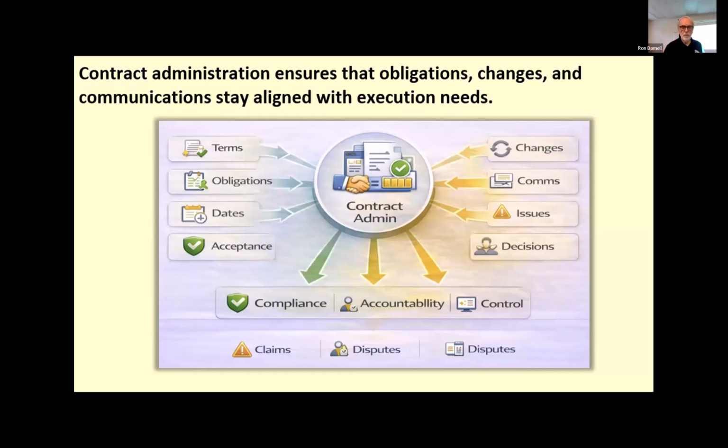From the perspective of the project, contract administration includes monitoring contractual obligations, verifying that agreed deliverables are being provided, documenting key communication decisions, and managing contract-related issues before they escalate. In the PMBOK 8, claims administration is part of the discussion and reinforces that contract administration remains a meaningful part of execution.